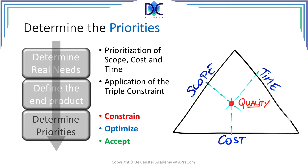The last process in this first step is to determine the priorities. The priorities relate to scope, cost, and time — it is the application of the triple constraint, also known as the scope triangle and the iron triangle. The first element to define is what parameter is constraining, what is limiting the project — it can be the scope, the time, or the cost. The second parameter is the parameter to optimize, and the last parameter is the parameter to accept. Accept does not mean that you have a blank check — there are still limitations to that last criterion.